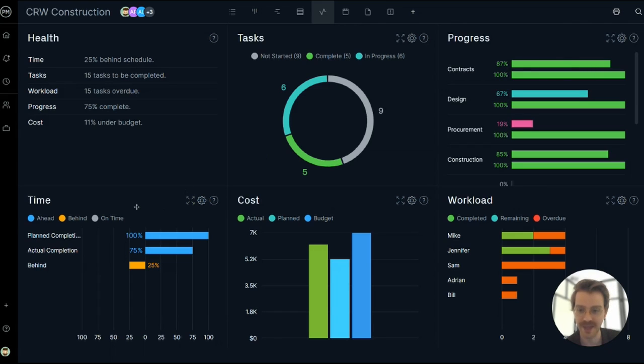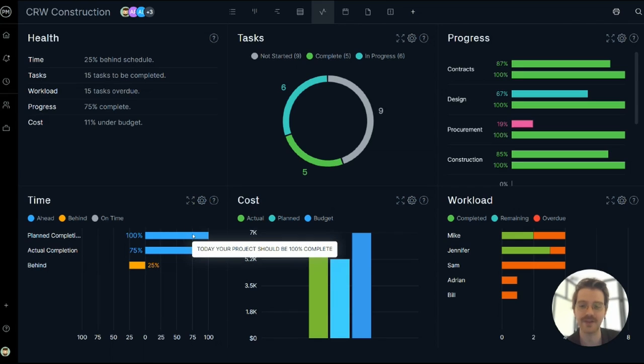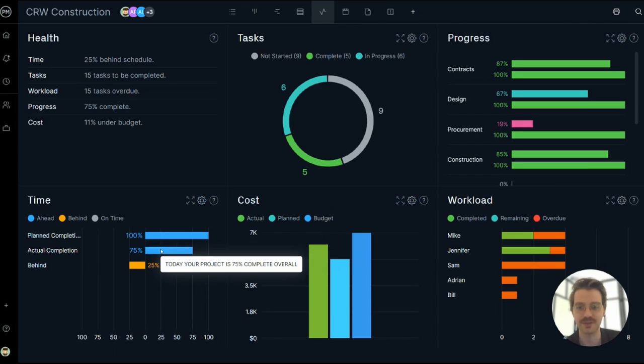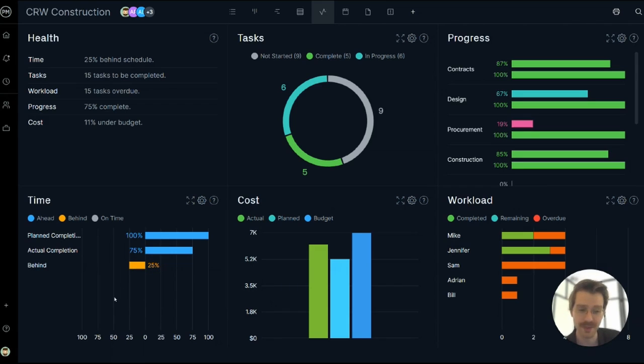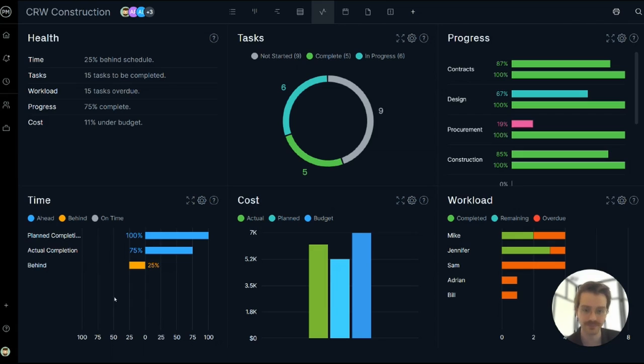The time panel shows that same sort of data at the project level. What I mean by that is here we're seeing that the planned completion should be 100% by today, but the actual completion is only 75%, which means I'm 25% behind schedule. Really powerful panel that instantly shows if you're ahead or behind the schedule.